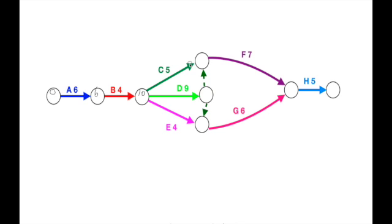Moving to the right, we need to be mindful of two arrows at two nodes, one of them coming from activity D. So we're going to go to the middle node first. The number there is 19, which is 10 plus 9. There are two values to check at the top node. 19, the maximum time, is what we place down to ensure all activities are done. Likewise at the bottom, two values to check, again 19 is the result. So activity D is how we got the value of 19.